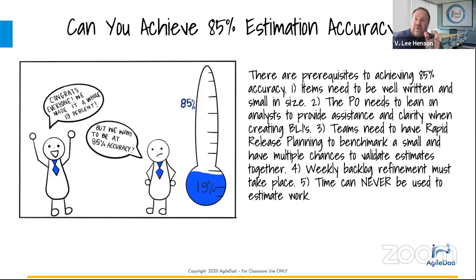Because once teams agree on something that's small in size, if I say this wall is small in size to paint, what is this wall? The team can look at that wall and say, based on that one being small, we think that one's medium. I'm like, okay, well, what's this one? Oh, well, that one's definitely medium. Okay, what's this one? That one's extra large. So the more walls I throw into the mix, the easier it becomes for the team to size.